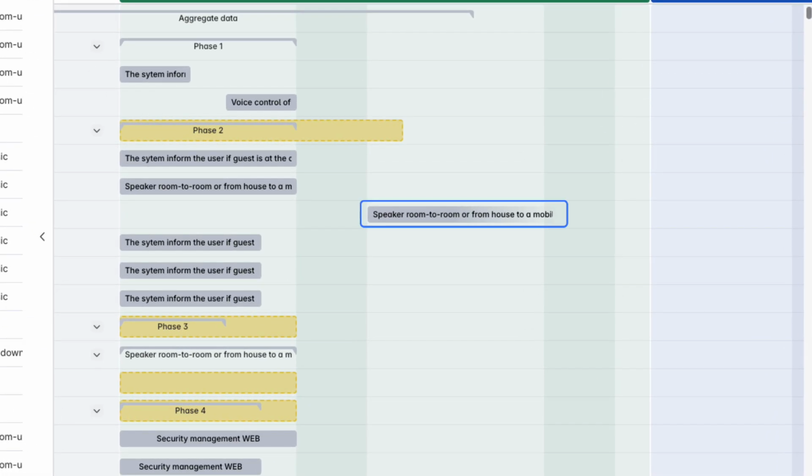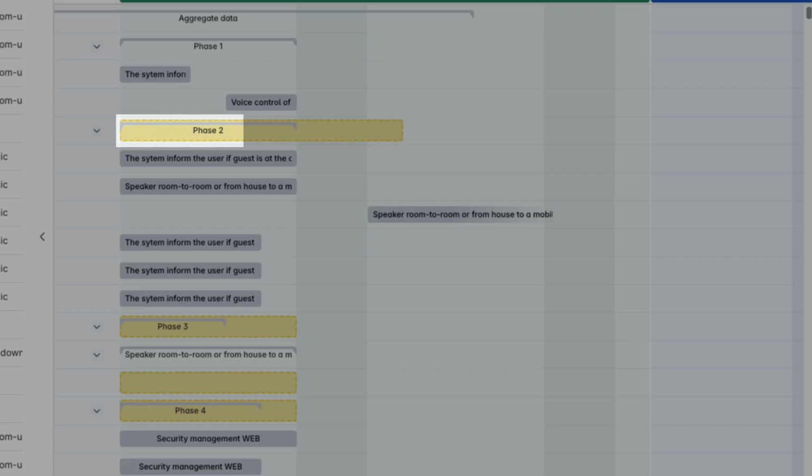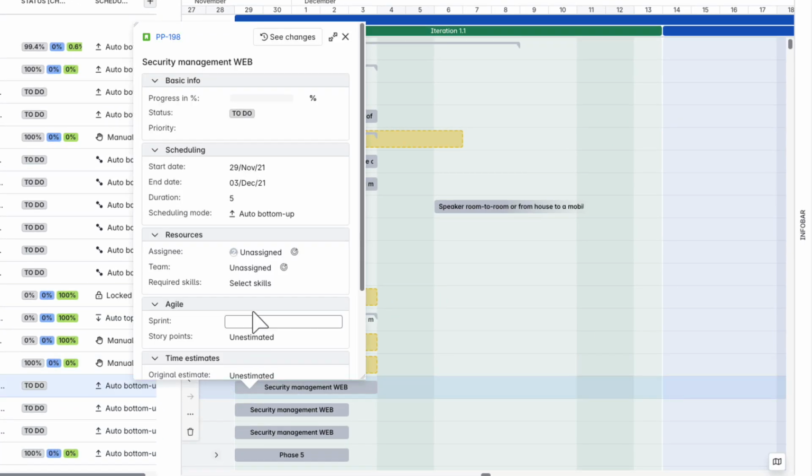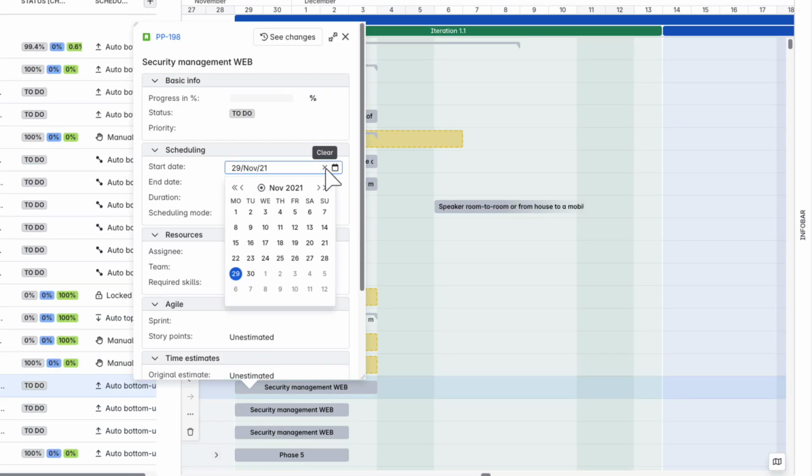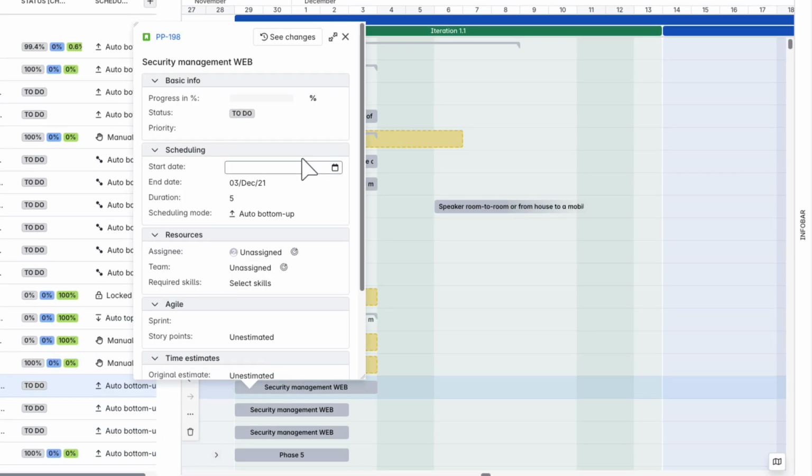In this example, the child task has only a start date, and this date is after the parent ends. Because the child falls outside the parent's range, the period warning appears. Remember that period warnings ignore tasks with no start or end dates.